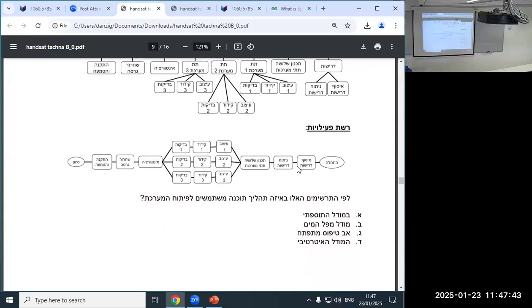It starts collecting the requirements, analyzing the requirements, defining 3 levels of 3 subsystems of the system. And here they are, and each one has its design, its programming, and its check. Design, programming, check, design, programming, check. Then integration, then releasing of the version, and installing and finishing.